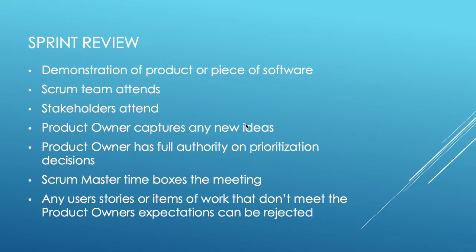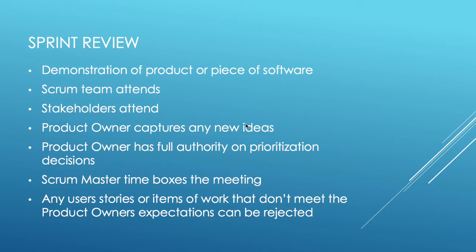Even if a user story has passed the definition of done, the product owner can still overrule this, because the product owner is effectively the voice of the customer — so they can accept the work or reject it. But 99% of the time they always accept it, because if the product owner has been fully involved over the last two weeks, attending the daily stand-ups and all the other Scrum events, they are fully transparent and have visually seen everything. So it should not come to them as a surprise, and they should be accepting most of the work the team has been working on.